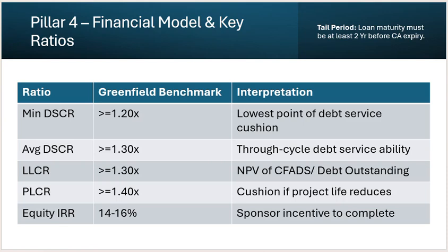A greenfield project is totally new, starting from scratch, where no construction has happened yet, and it is a fresh project where all the documents and clearances are required. Here the most important risk is construction risk. But in a brownfield project there is no construction risk. We have the past history. In the greenfield project we don't have the past history, but in the brownfield project we do, and we can check and analyze it.